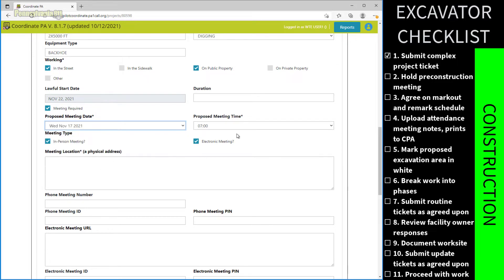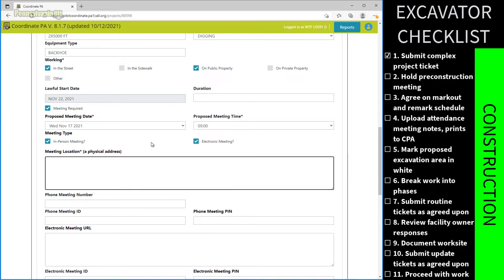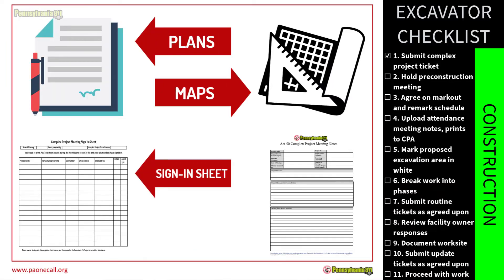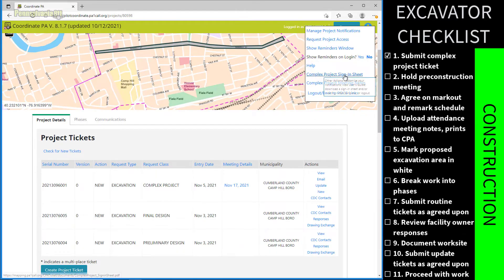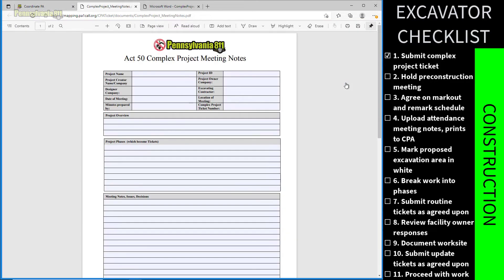Just like in a routine ticket, all affected facility owners will be notified. The excavator is responsible for inviting all other stakeholders including the project owner and designer. Facility owners are required to respond through CARL indicating whether they will attend the pre-construction meeting or that all of their facilities are clear of the work site. To prepare, the excavator should bring: project plans, maps, a sign-in sheet to record attendees' names, company names and email addresses, meeting notes, and a mark-out schedule. Templates for attendance and notes can be downloaded from CPA.